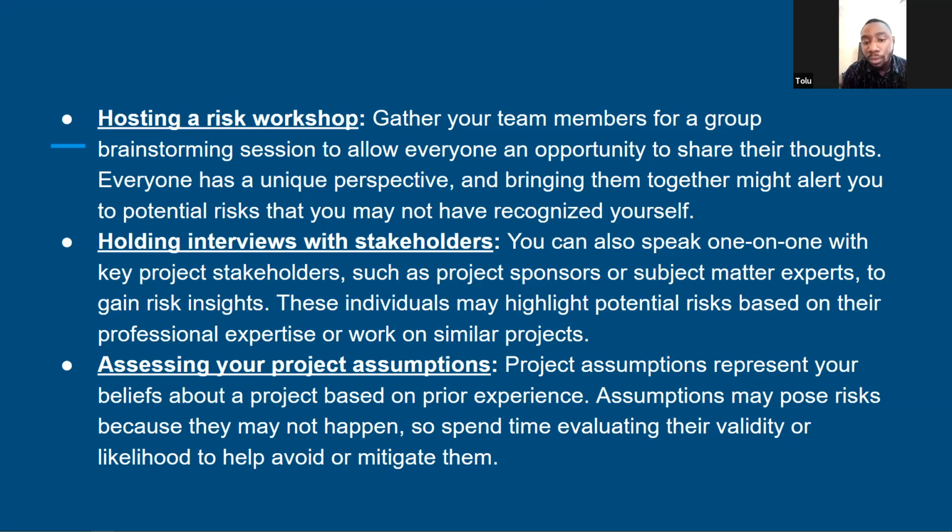Assessing your project assumptions. Project assumptions represent your beliefs about the project based on your prior experience. Assumptions may pose risk because they may not happen. So spend time evaluating their validity or likelihood of outcome, and mitigate them. Most of the time, while you are creating projects, you as a project manager want to assume scenarios that can cause a problem for the product you are trying to create. Sometimes the assumptions might not come to reality.